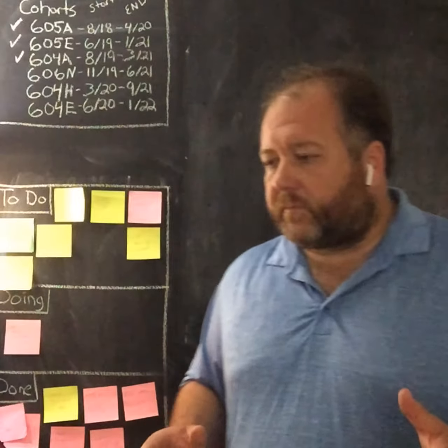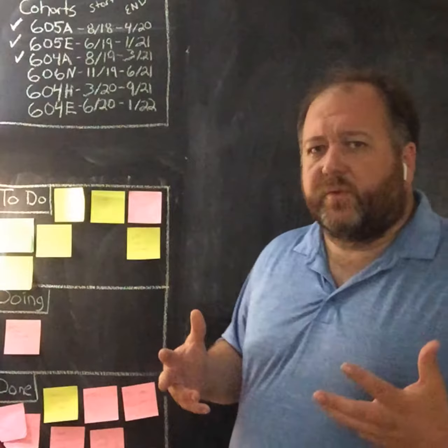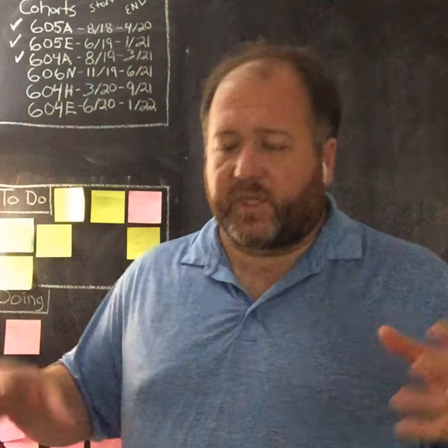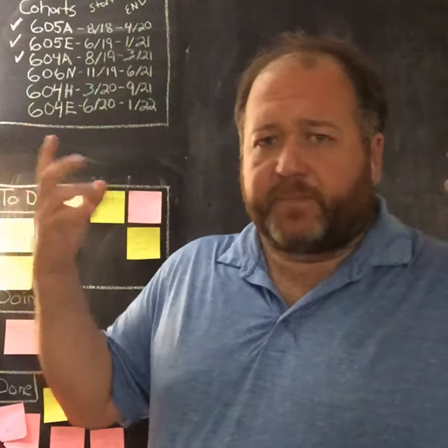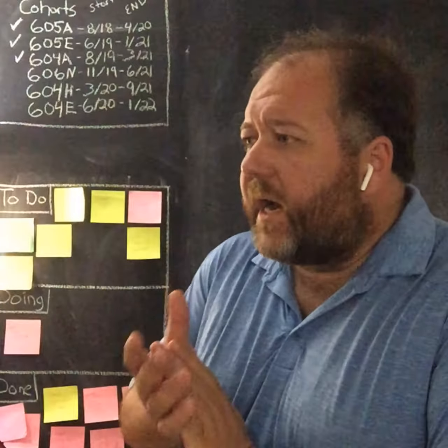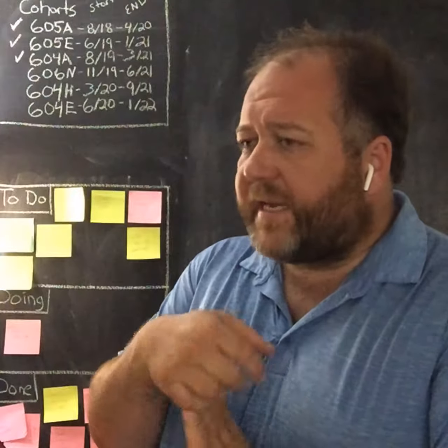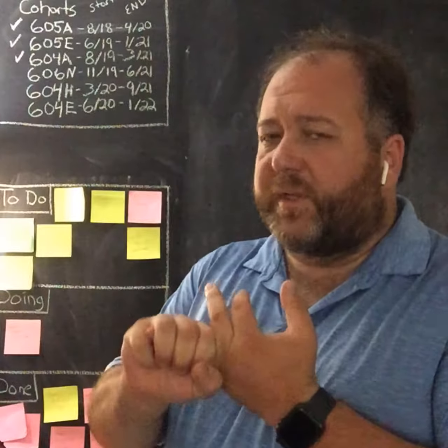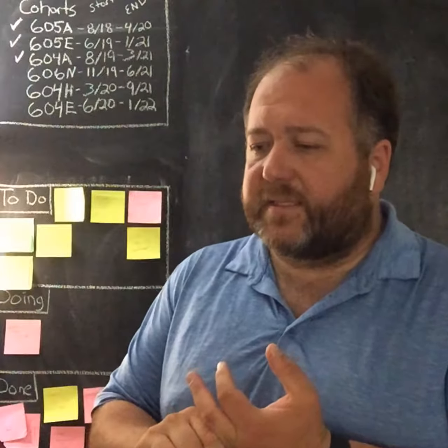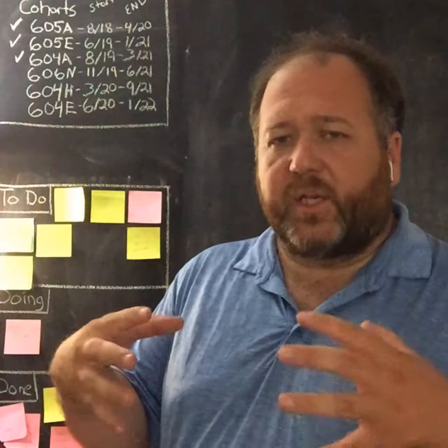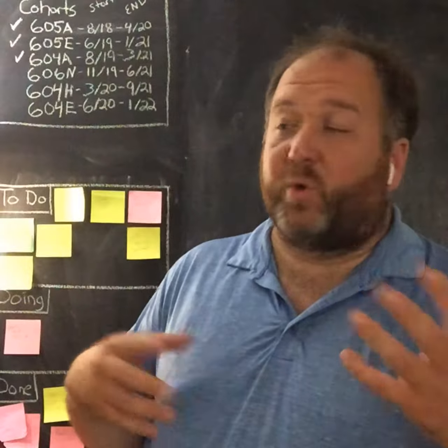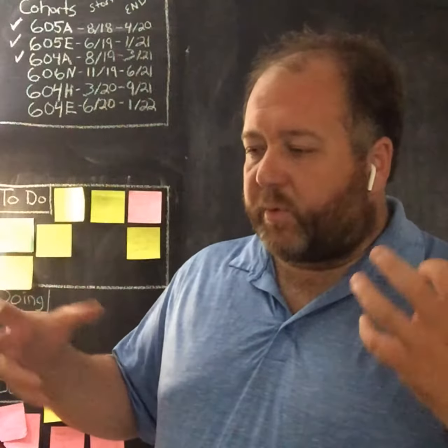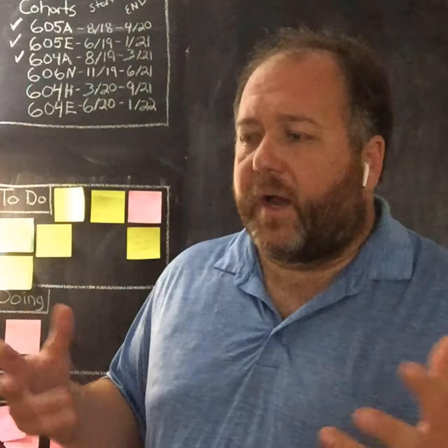So, what goes into the project scope document? So, there's a few things. First of all, there's the normal heading to identify it with the project. And then you get right into the project description and more importantly, the project justification. And this is where you essentially try to pull it all down to an estimate or even a guess as to the final return on investment, the ROI of the project.